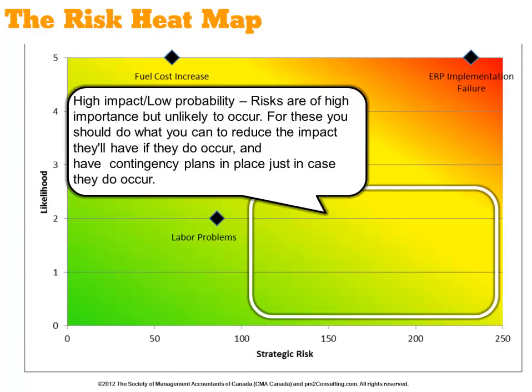Risks in the bottom right corner — those which have a high impact but a low probability — are of high importance, but of course unlikely to occur. For those, you can do what you can to reduce the impact if they do occur, but you're best off just having contingency plans in place. Money invested here may not necessarily pay off, due to the low likelihood of these risks occurring.